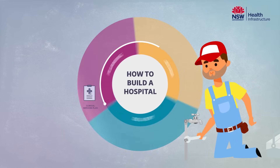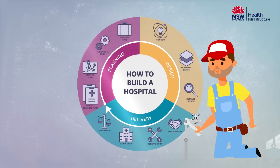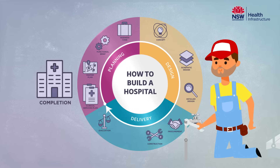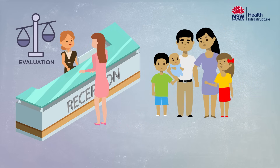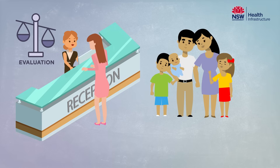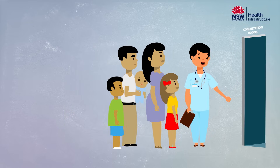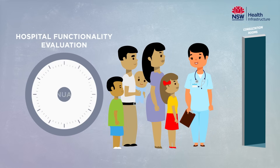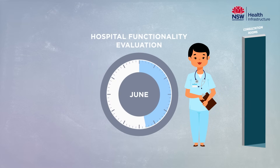Once construction is complete, we begin the commissioning phase. This involves checking and testing of all components and systems of the new facility. Staff orientation and training also occurs to ensure everyone is prepared to welcome the first patients through the door. Once staff and patients have moved into their new facility, Health Infrastructure continues to evaluate and assess the functionality of the new facility for several months, which also helps to inform our future hospital projects.